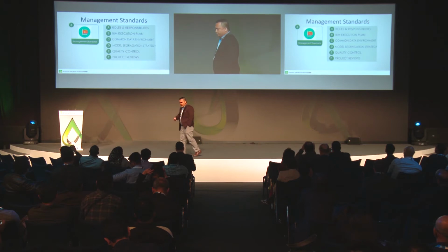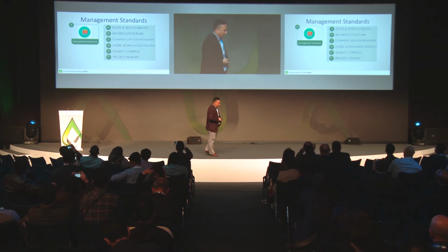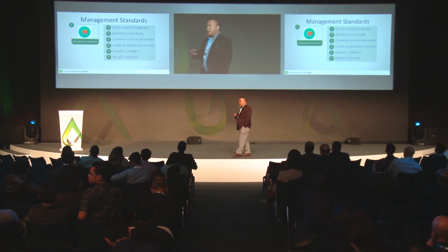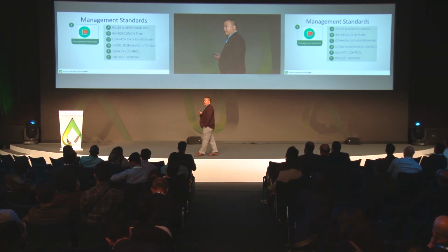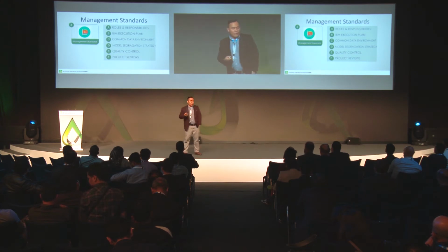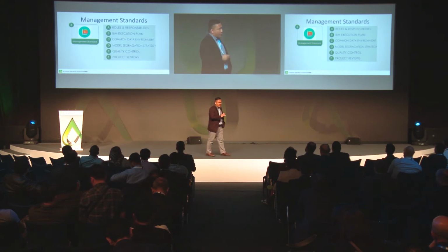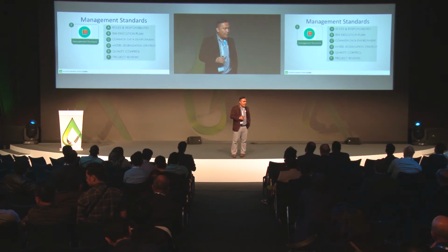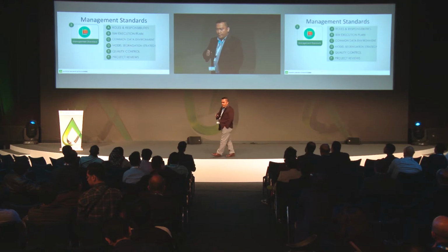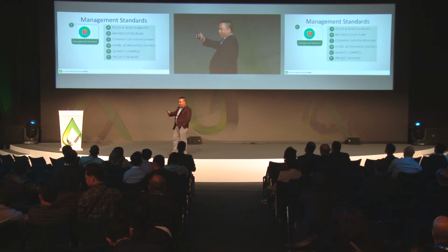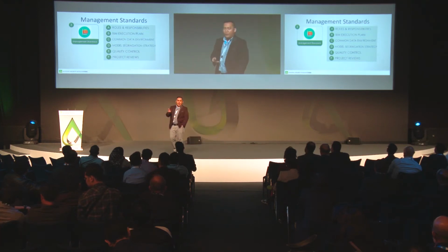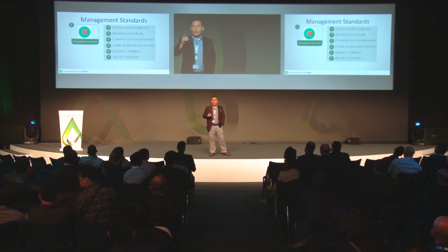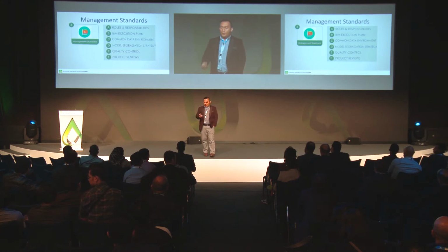Management standards. When we talk about management standards, these are basically the procedures and processes that determine or manage the delivery of information requirements. So it includes roles and responsibilities, BIM Execution Plan, Common Data Environment. Have you heard about the term Common Data Environment? Yes? Okay. Common Data Environment, Model Segregation Strategy, Quality Control, and Project Reviews. So for the management standards, these are the minimum specifications that you have to put.